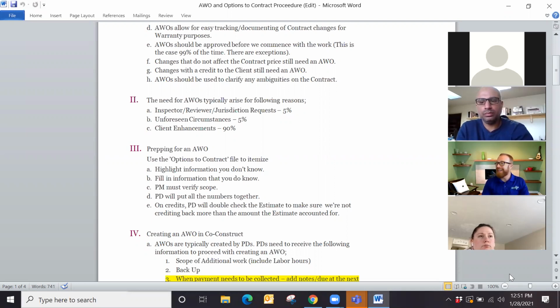Right. But anywhere else on that whole first floor, when the sewer line finally got determined, we could have done that. The client took the stance of, you should have known where the sewer line was. Well, we didn't know where the sewer line was until we started breaking up and seeing where it was. So that should have been an unforeseen to have to demo and reinstall that floor. In that same example, that slab was 7 inches thick.